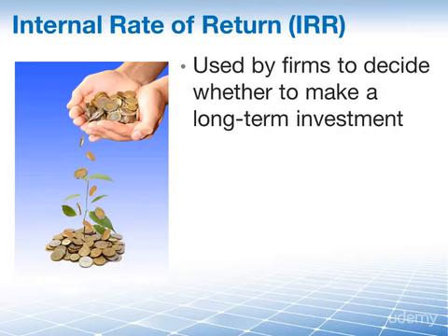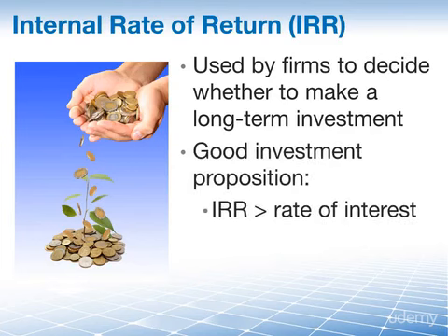Since it's relatively easy for anyone to go to a bank and deposit the money in an interest-bearing financial instrument like a savings account or a certificate of deposit, a CD or a time deposit, a project is a good investment proposition if the IRR is greater than the rate of interest that you could be earning, if you look at the prevailing interest rate for the time frame of your investment.